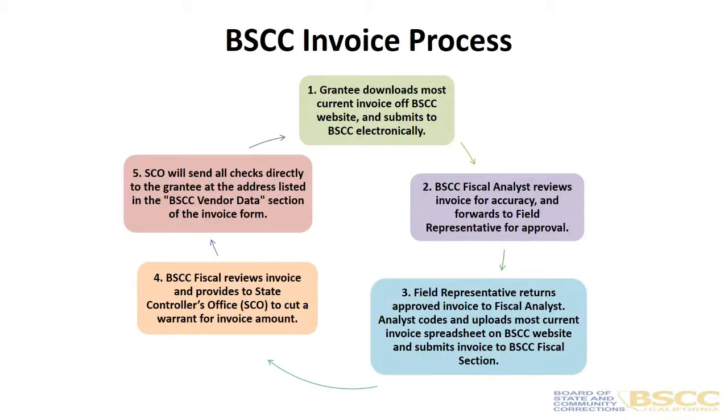Once Ricardo approves it, he will provide it back to us so we can start the accounting process. We submit it to the state controller's office, and then they send the checks directly to you. So that's a little summary of the invoice submission process.